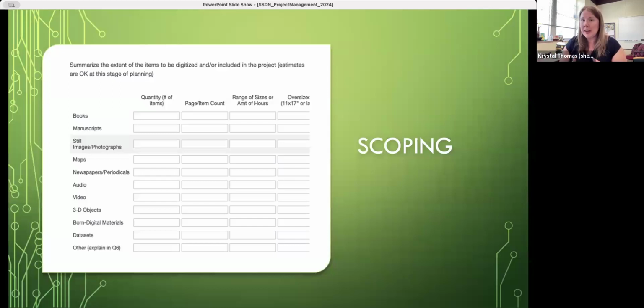All that information and the decisions made on the scope within these discussions can then be transferred to the project briefing document, which should be created regardless of whether there's a formal project charter or not. One note here, and I'll say this a couple of times today, you also want to be clear about what is not in scope. I will often list that out very clearly in project documentation so that no one is confused about what is not being included in the project.